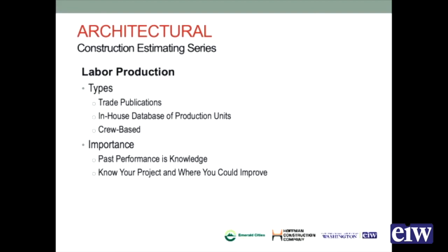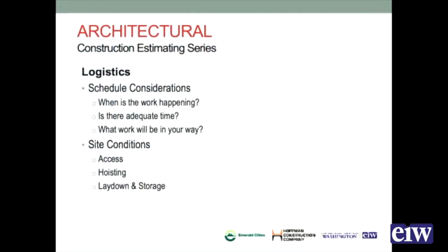for a specific piece of work. And in RS Means, I believe you can develop an assembly-like formula. And so, as Chris mentioned, we may have 2 carpenters and a laborer involved in this work. It's really important that you're verifying with your historical data, as mentioned again by Chris, as well as confirming with your supervisors to get better information to make sure that your assembly values are correct.